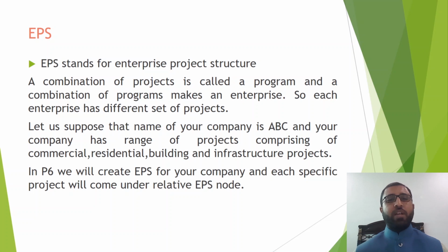So when you are working in maybe a PMO office, definitely you will be dealing with maybe tens or dozens of projects. Or even if you are working on a site, your PMO office is managing the projects based on the EPS. So first, why do we create EPS? The answer is that it will be easier for us later on to put the different projects in whichever section they belong. So later on the tracking and monitoring will be easy, and also the organization managers and different peers of your organization can be assigned to your project.